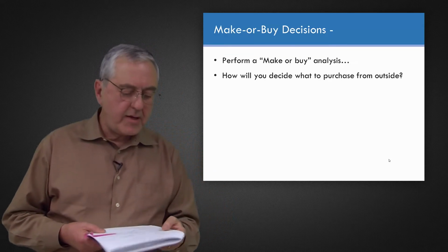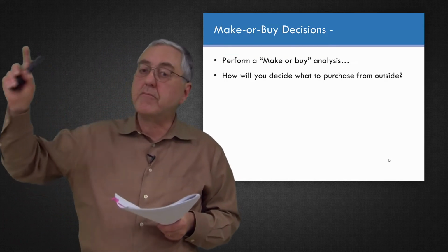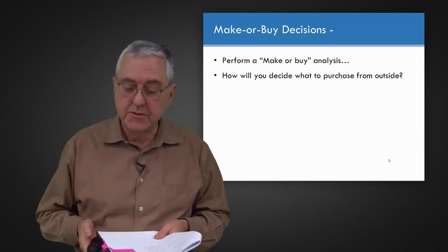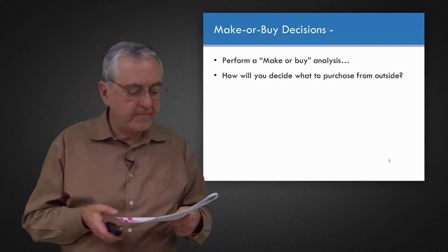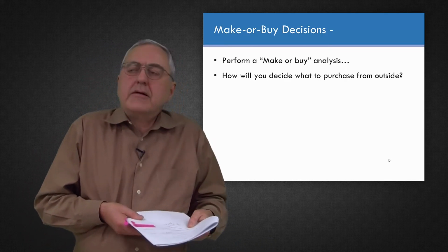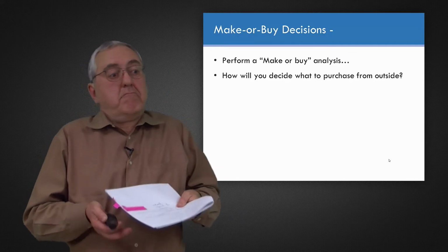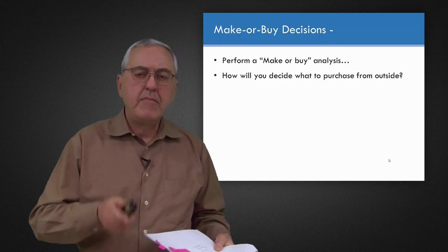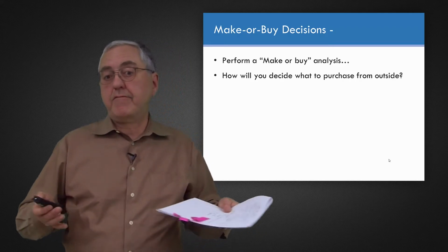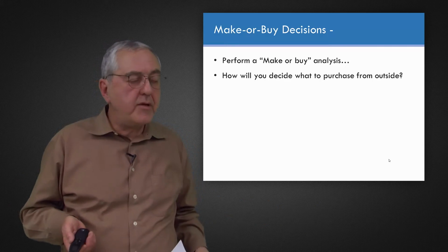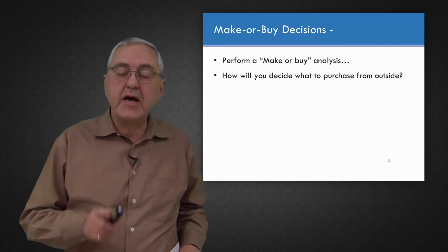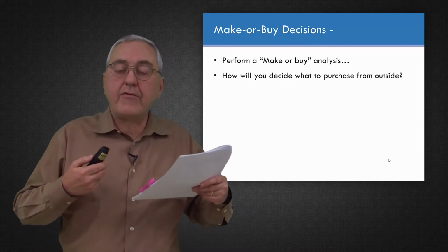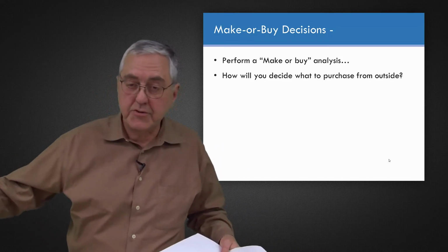Another criteria might be, is there a competitive environment? Are there a number of suppliers out there who do that work and can be competitive at giving you prices? Maybe you'd like to take advantage of that. Maybe an important consideration, well, I think almost always an important consideration is, what about core competence? Maybe your company, in the case of renovating the office, would say, we're not in the business of designing renovations or carrying out renovations. That's not our core competence. Those are services we will always purchase from outside.